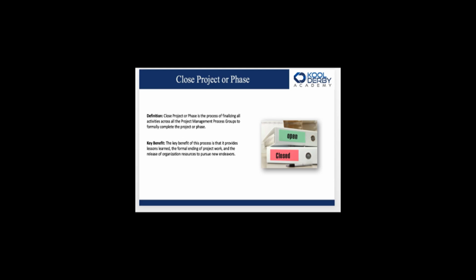Although it is listed here as part of closed project or phase, many folks who teach these classes, like myself, state that resources are actually released a little bit earlier after executing. So maybe as soon as they are done doing the work, think about an electrician that you have for a project. They're not going to sit around till the closing process group and say, oh, okay, can I leave now? They're likely going to move on as soon as the work is over. So be aware of that, these resources may not be available for you later on.